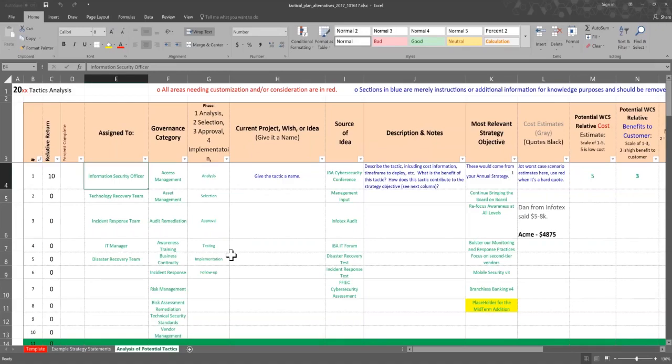But ultimately, this is something that's brought up in meetings the last couple months of a year before the plan year, and then we bring it up quarterly throughout the plan year during the steering committee meeting, to check status, and we sort it by what we actually decided we're going to do and that sort of thing.